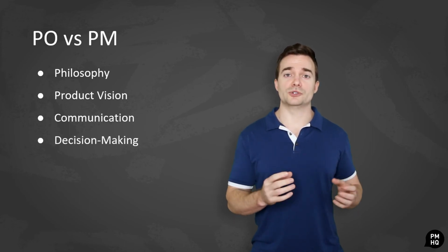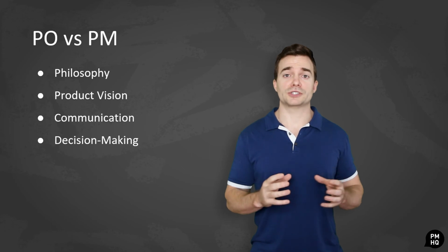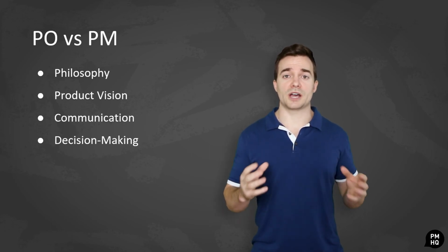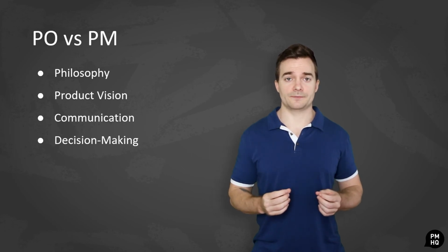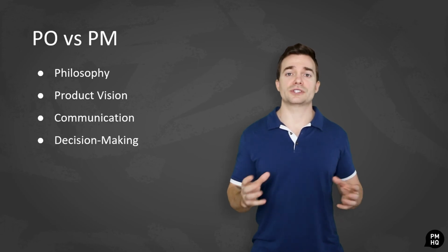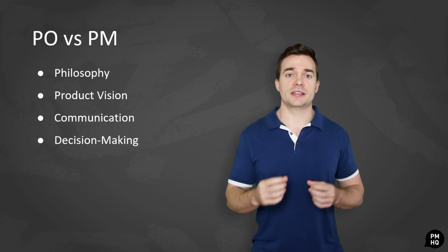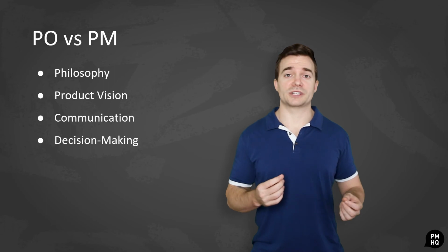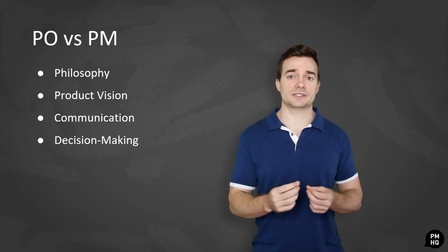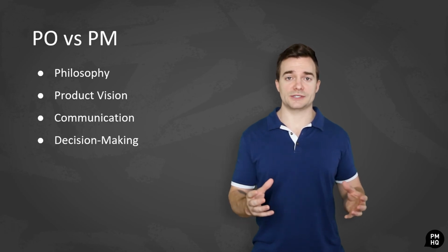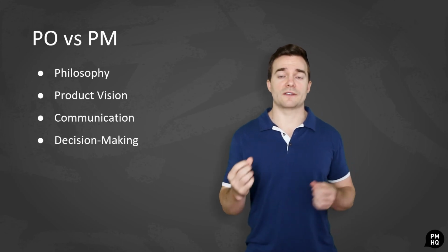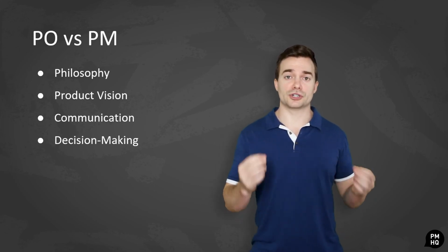Lastly, while it is true that product owners and project managers are key positions during the decision-making process, the way they go about doing so is different. A product owner makes all the decisions related to the product they own based on the feedback from customers, stakeholders, and the development team. The project manager, on the other hand, does not own the entire product. Therefore, they are restricted when it comes to the kinds of decisions they can make. For example, a project manager usually has authority to execute decisions like prioritizing tasks and activities. However, in most cases, project managers cannot make decisions on product details such as product vision and functions, since that falls out of their jurisdiction.